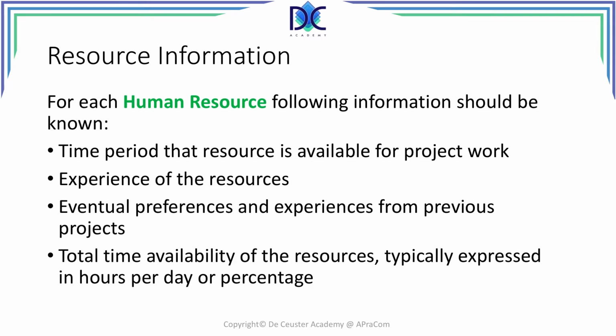For every human resource, we should know what period that resource is available for project work. What are the experiences that those resources can offer, and what experience they obtained from previous projects, and do they have specific preferences? What is the total time these resources are available for project work? It's typically expressed in hours per day or percentage.